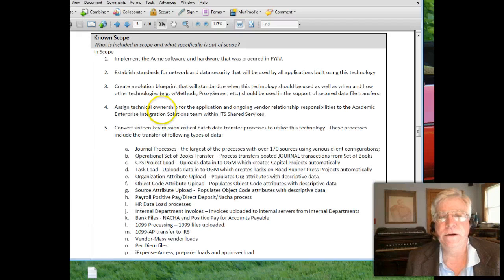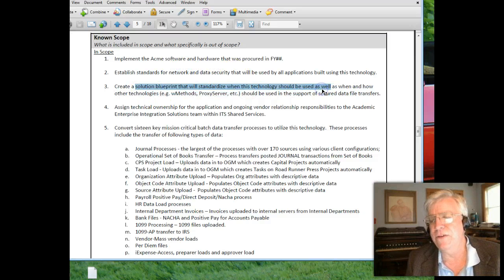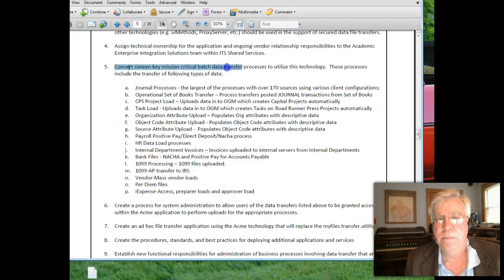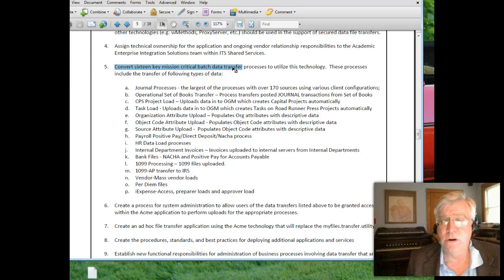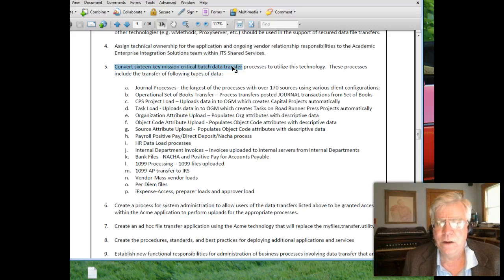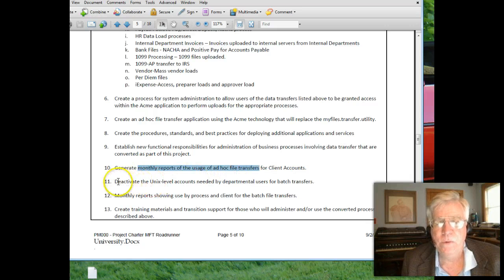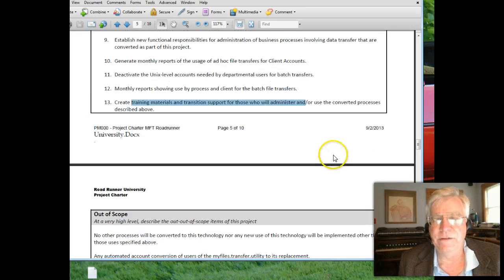What's the scope? This was the list of things we knew we were going to do: implement certain software, establish network and data security standards, create a blueprint to standardize file transfers, assign ownership to the system, and migrate 16 mission-critical batch processes from the old system. We also handled ad hoc person-to-person transfers, created procedures and best practices, added reporting capabilities, deactivated old systems, and trained support staff. We had a clear set of deliverables.